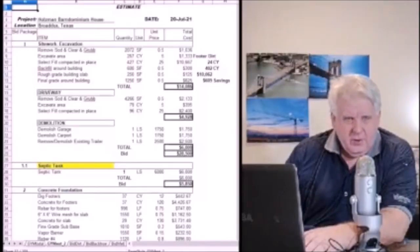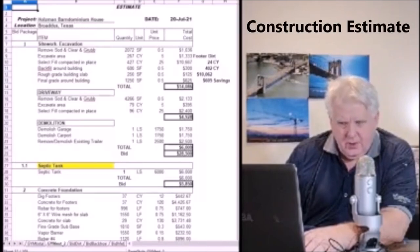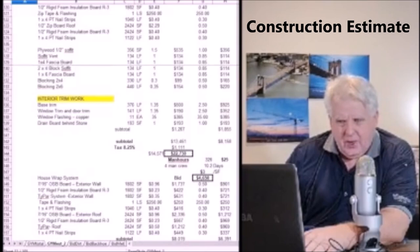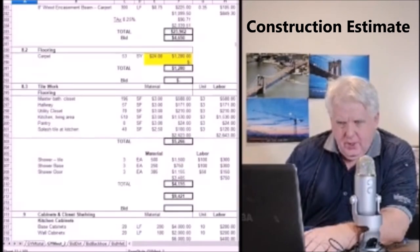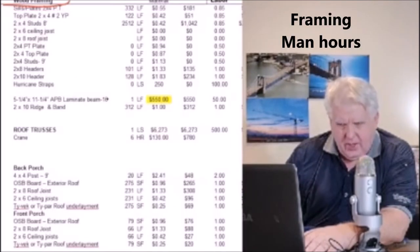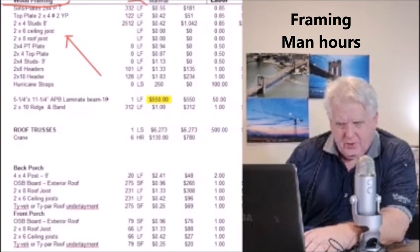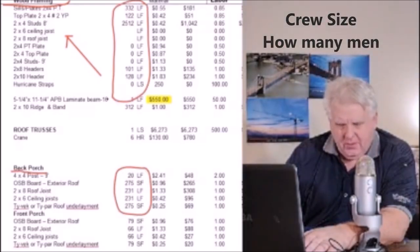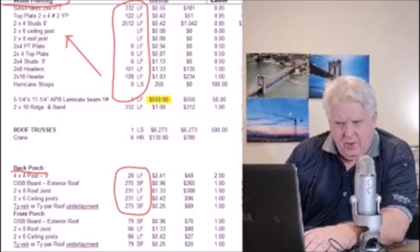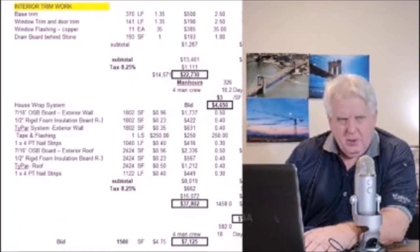To get a more detailed list on a construction schedule, I'll go to my construction estimate and do an estimate on the entire project. From that estimate, I'll take some items and put them into the schedule so that they'll be the activities of that schedule. For the durations, you go to the particular item — say the framing — and the takeoff shows you how many man hours are going to be done. From those man hours, you can determine your crew size, divide it out, and get the number of days. You can do that for all your activities — your foundation, framing, drywall — and get with your trade contractors to have them give you input on their time durations.